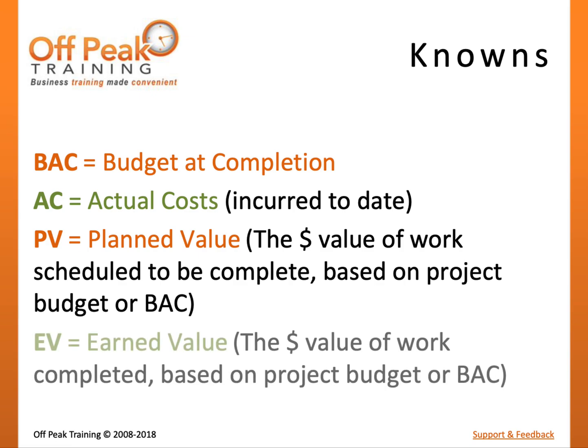In contrast, Earned Value represents the value of the work that has been reported as complete. By knowing the percentage of work that has been accomplished and the Budget at Completion, the team can calculate Earned Value. For instance, if the project was scheduled to take five days and cost $1,000, the Earned Value after 40% of the scope statement being completed would be $400. Simply put, Earned Value is the dollar value of the work that is completed.